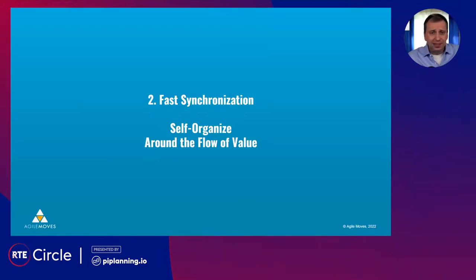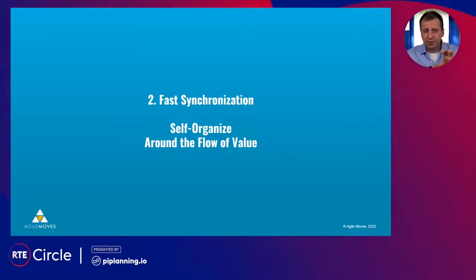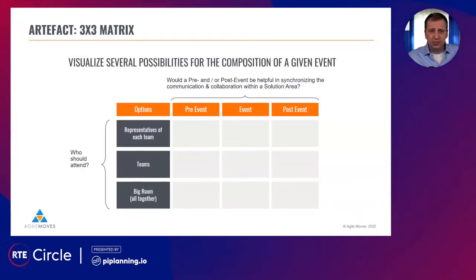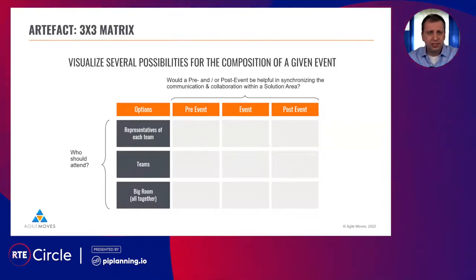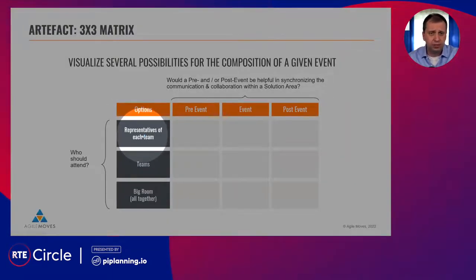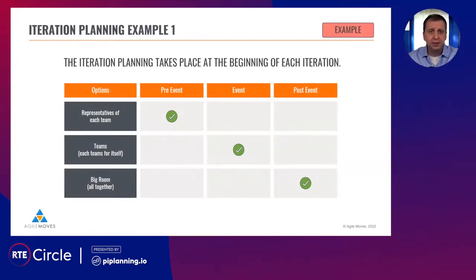The second aspect is fast synchronization. If we set up a solution area with two to four teams and synchronize fast right from the beginning, it's usually not much effort to agree on a new aligned understanding of an objective if you want to change something. For event synchronization within a solution area with four teams, we use a three-by-three matrix: for each Scrum event — planning, daily, review, retro — we think about what could be a pre-event, the event itself, and a post-event, and who takes part.